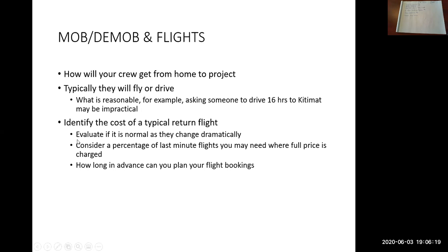As this second bullet here says, consider a percentage of last minute flights that you may need where full price is charged. You're not going to get a discount if it's a last minute flight. So how long in advance can you plan your bookings?